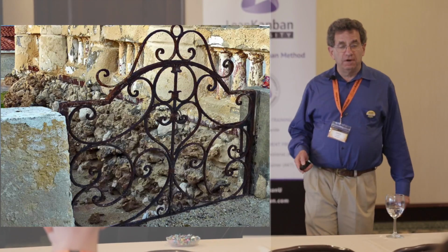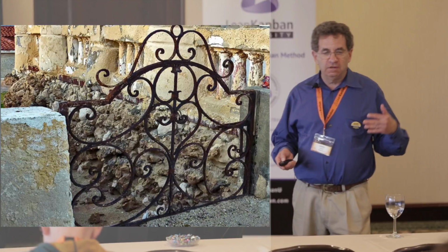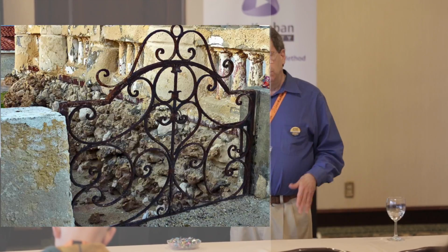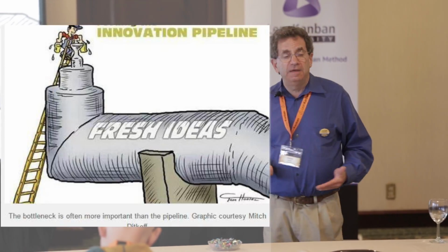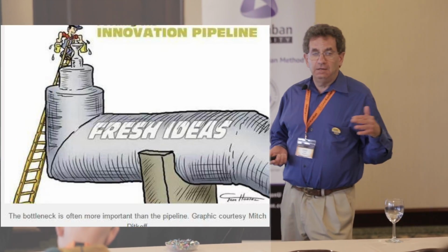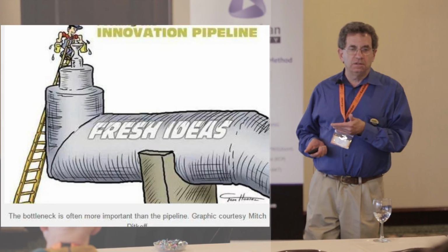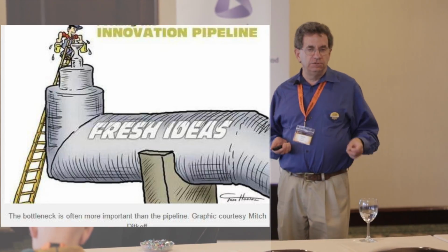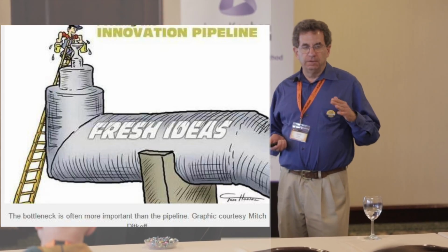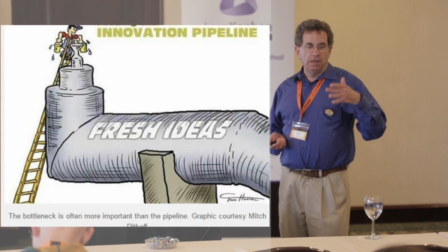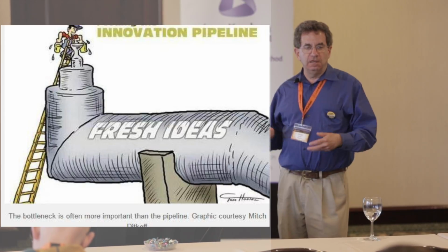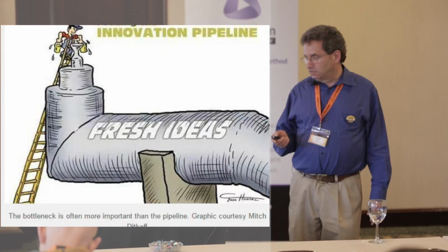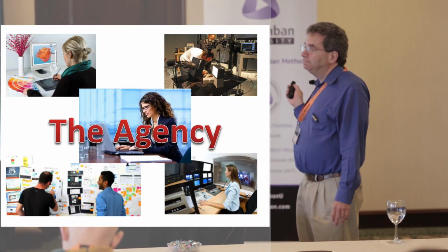We transitioned from staged, phased gate reviews with lots and lots of approvals and governance to an idea pipeline. And that pipeline, the primary metric that we apply is flow. And our flow metric includes a discovery phase. So from the time that a project gets into the idea pipeline until the time that we've completed discovery, that's our primary flow metric. Okay.